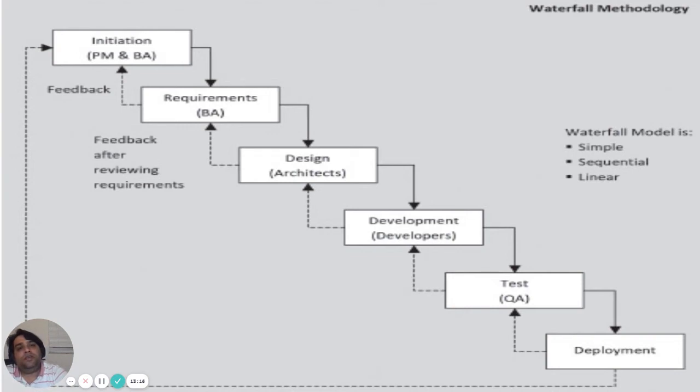This certified output is called the baseline and can be changed or modified in a controlled manner. So it can be modified in a very controlled manner if it is needed, if it is necessary. But it is going to affect the scope of the project. In a waterfall model, if the scope of the project has been changed, a lot of things change, associated with the budget, the resources, with everything. The baseline output will become input in the next phase. Whatever the output of the phase, it would be the input of the next phase.